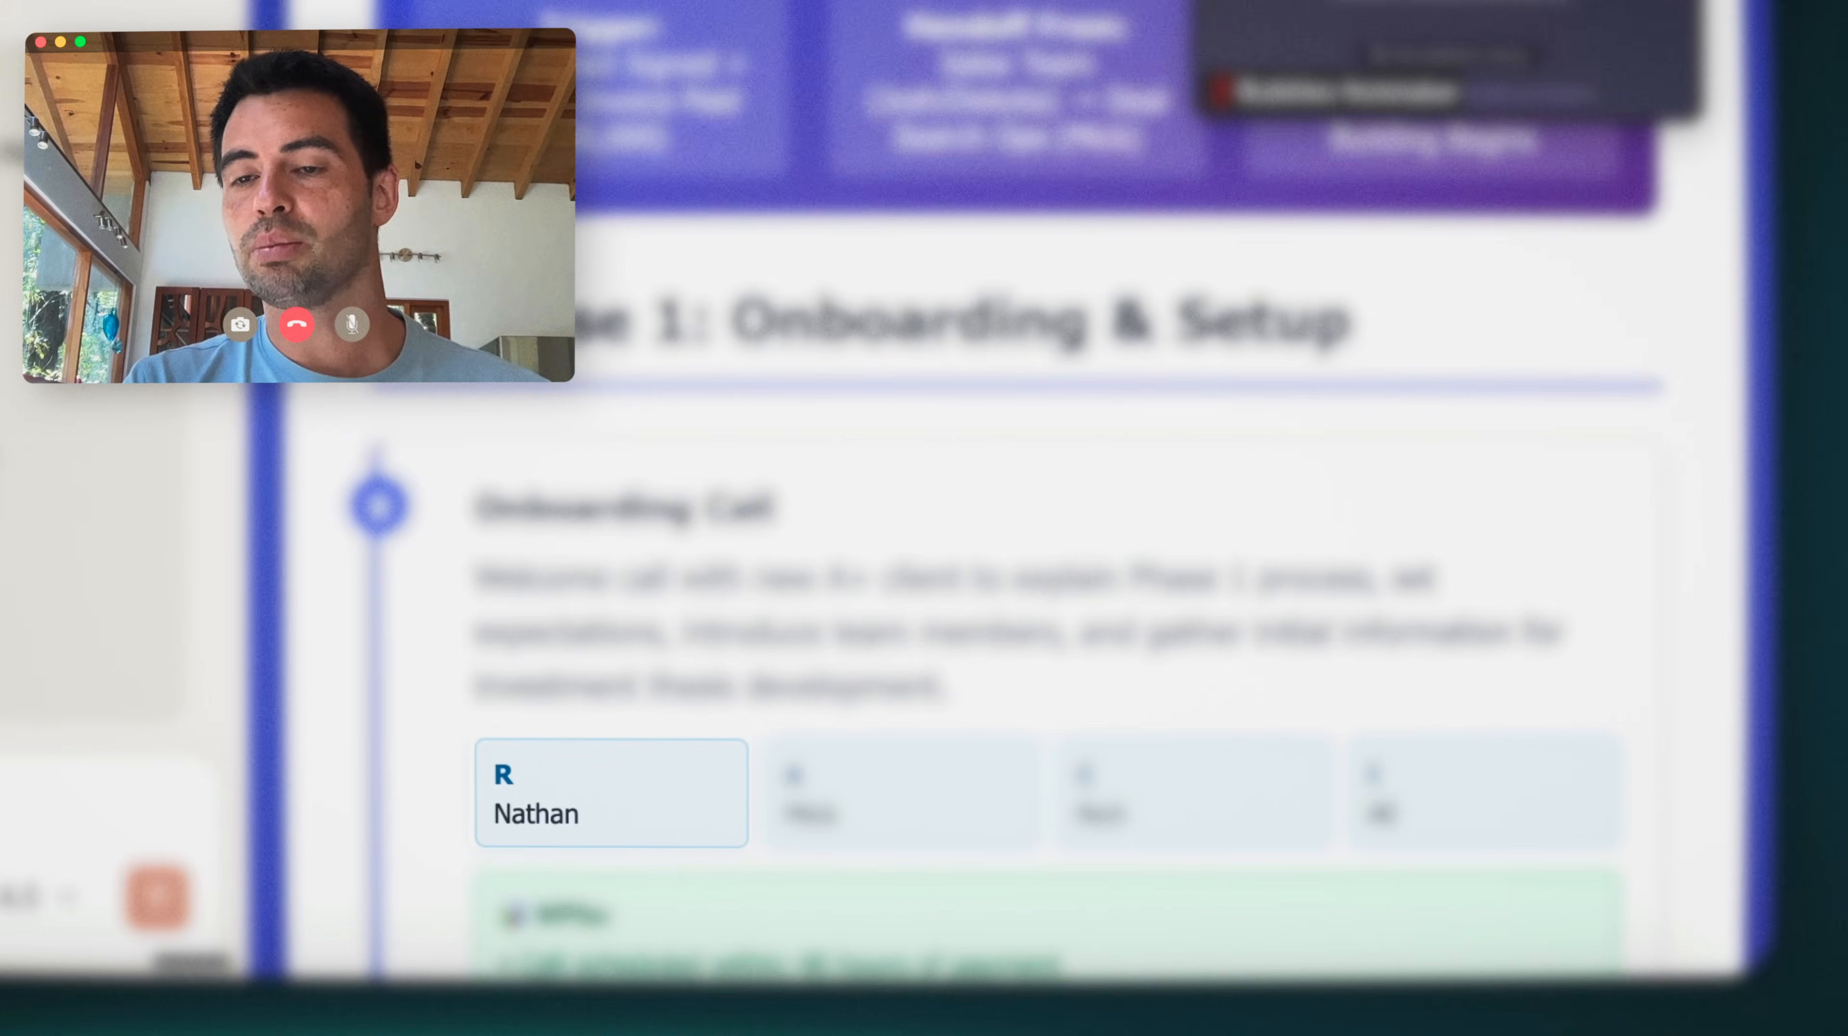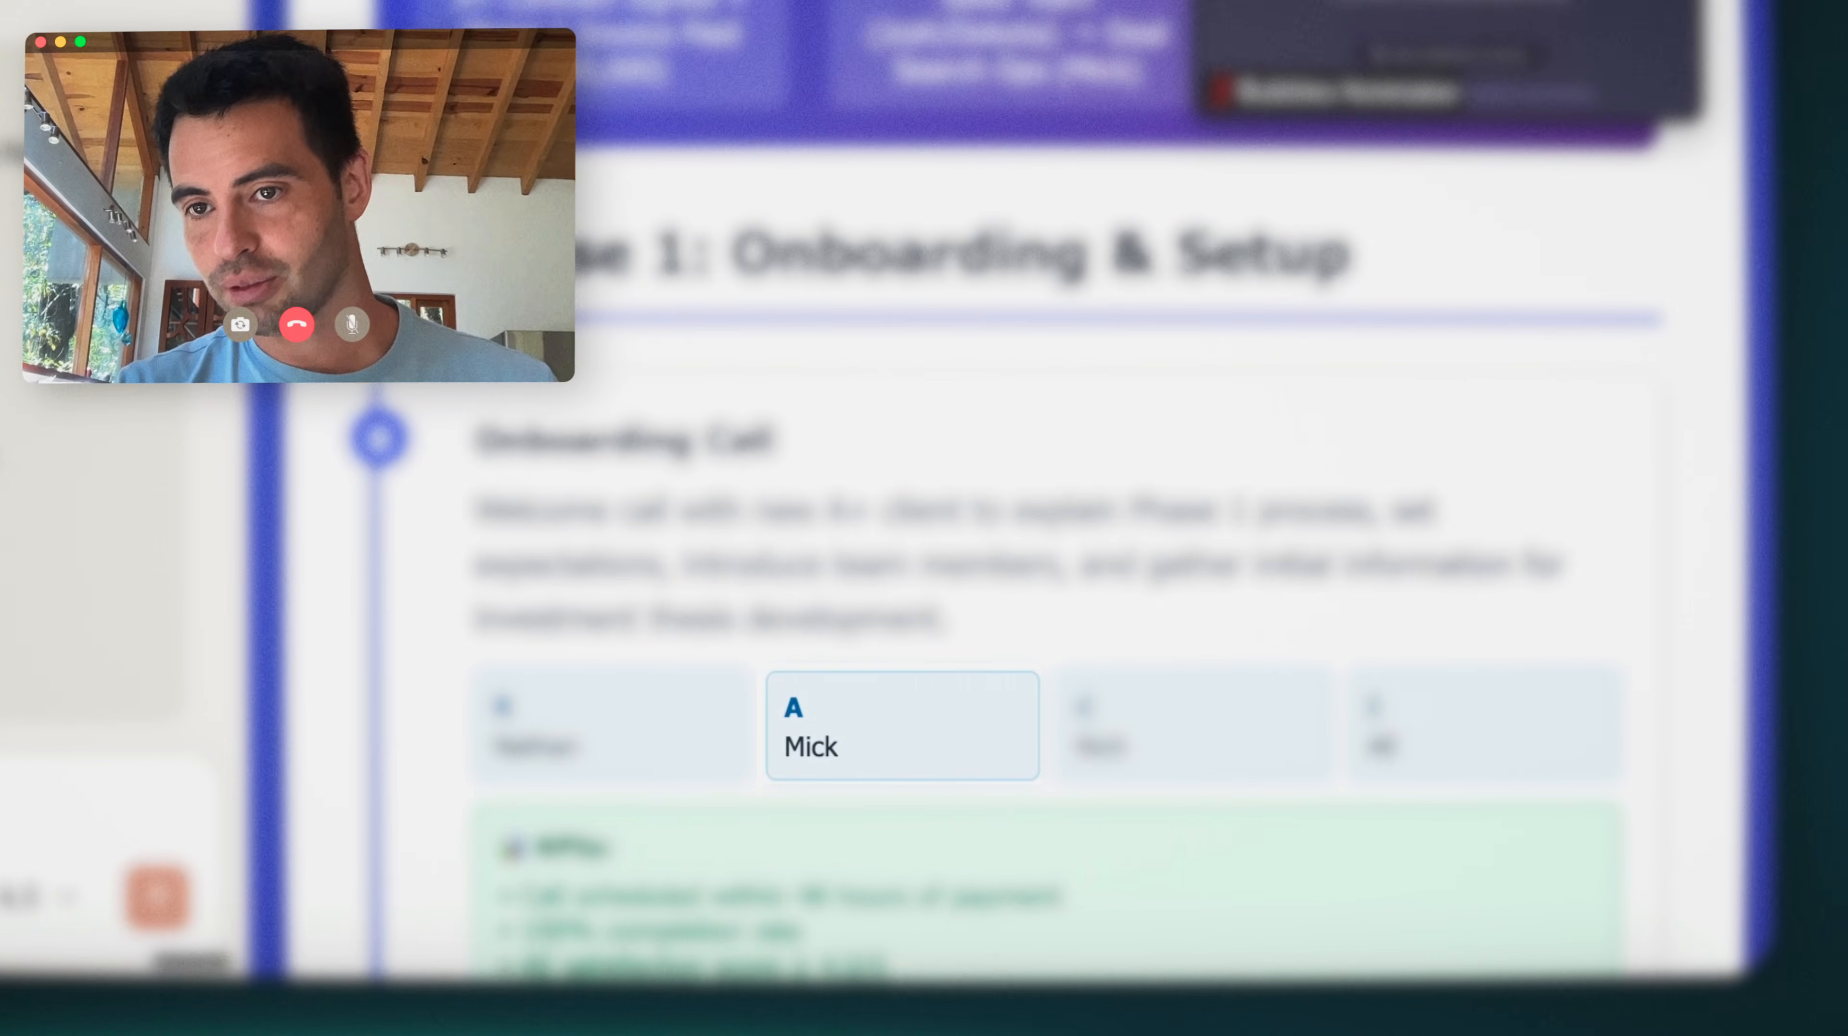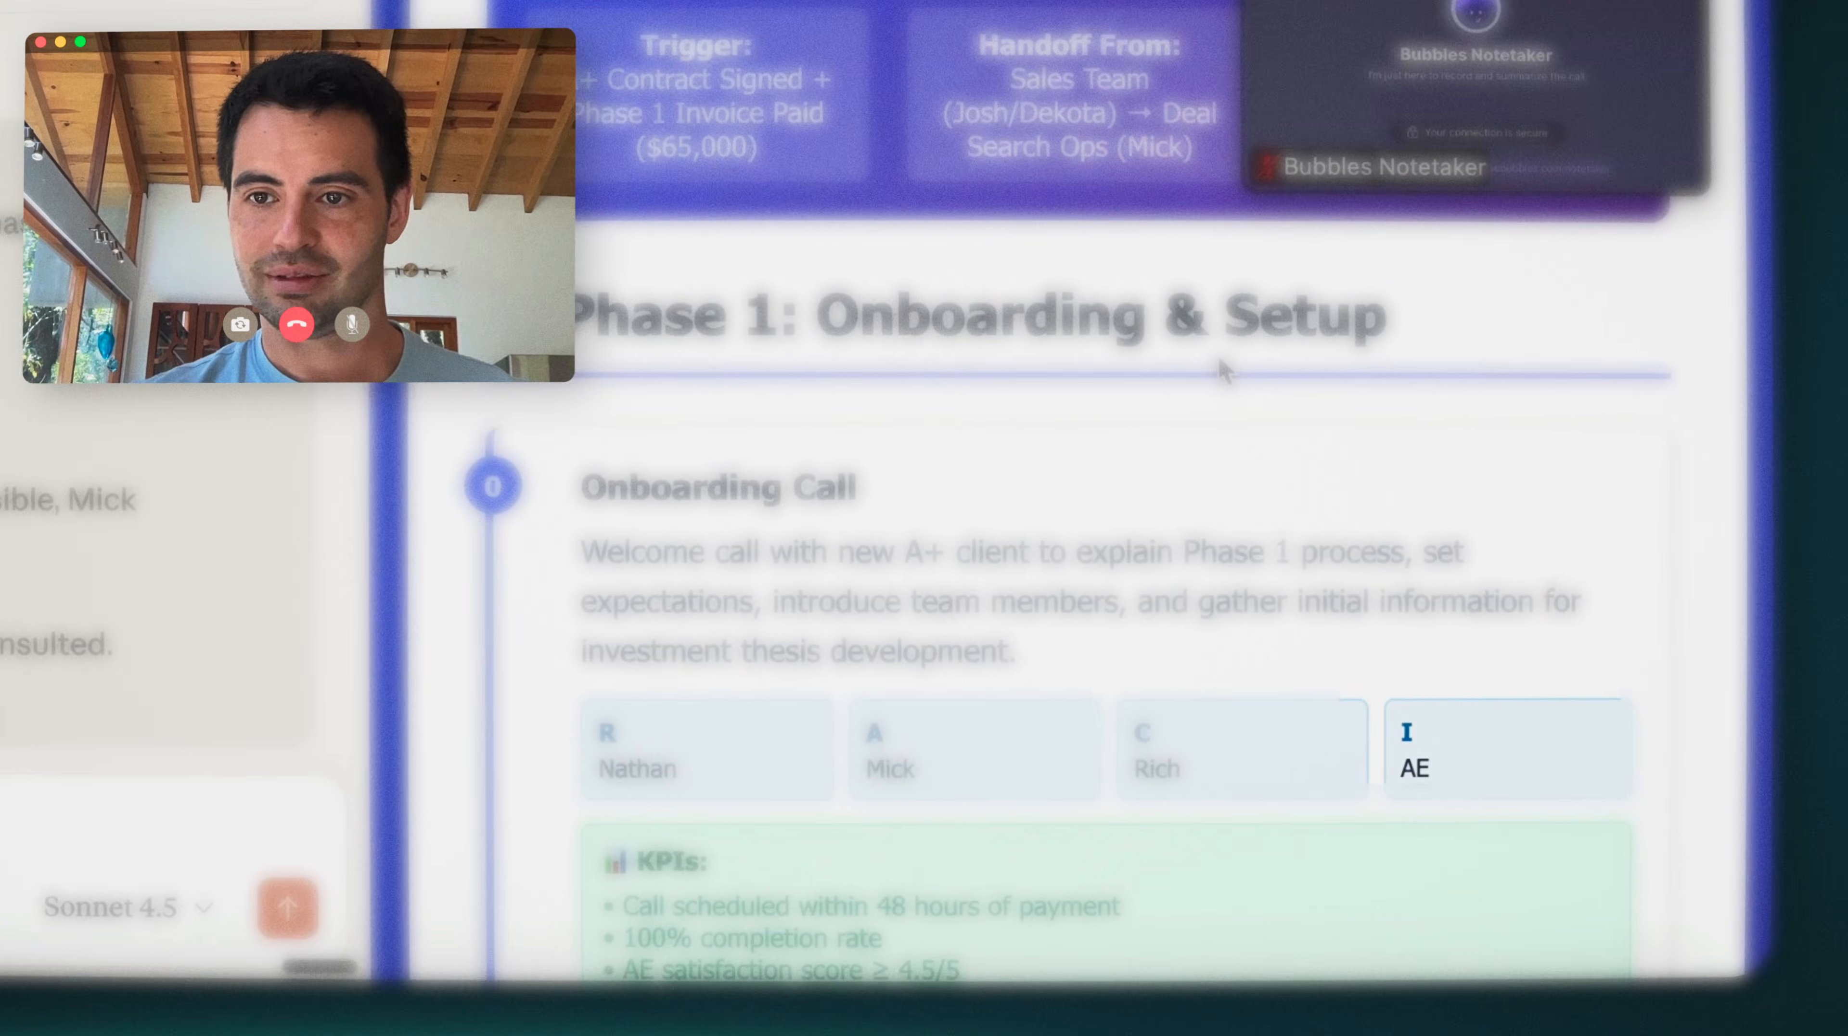So responsible would be the party that's actually doing the work. It could be multiple people responsible if people are working together or in parallel, most of the time it's one person and best practice would be one person. Accountable is usually that person's boss. And it literally means they're the one that counts the KPI for success. And so that's accountable. It should always be only one person. If there's two people accountable, nobody's accountable.